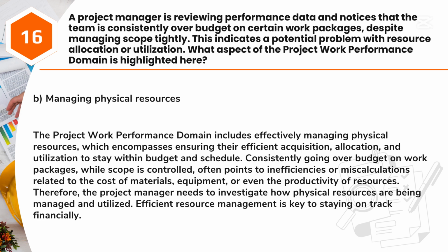The project work performance domain includes effectively managing physical resources, which encompasses ensuring their efficient acquisition, allocation, and utilization to stay within budget and schedule. Consistently going over budget on work packages, while scope is controlled, often points to inefficiencies or miscalculations related to the cost of materials, equipment, or even the productivity of resources. Therefore, the project manager needs to investigate how physical resources are being managed and utilized. Efficient resource management is key to staying on track financially.